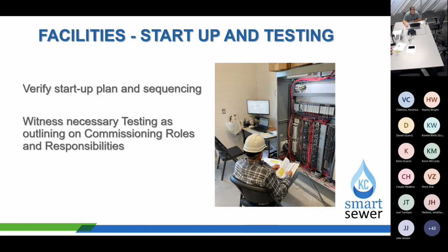The next big role as we get into this is really reading through and understanding the startup planning and sequencing of these plants. Some of these plants are pretty simple. Others can be incredibly complicated with a lot of moving parts and pieces and a lot of different entities involved with getting these things started up. So hopefully the contractor's working with you and putting together a proper startup and commissioning plan, and you can see all the parts and pieces ahead of time.